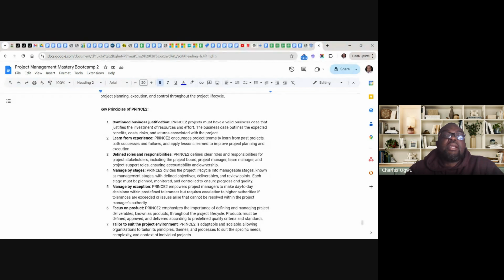Then the key principle is learn from experience. This is when the project lesson learned becomes very, very active. Every time companies or project teams are working on PRINCE2, it becomes a norm that the project team must at least once a week do their lessons learned. You must capture lessons learned at every stage. You must do that very well.